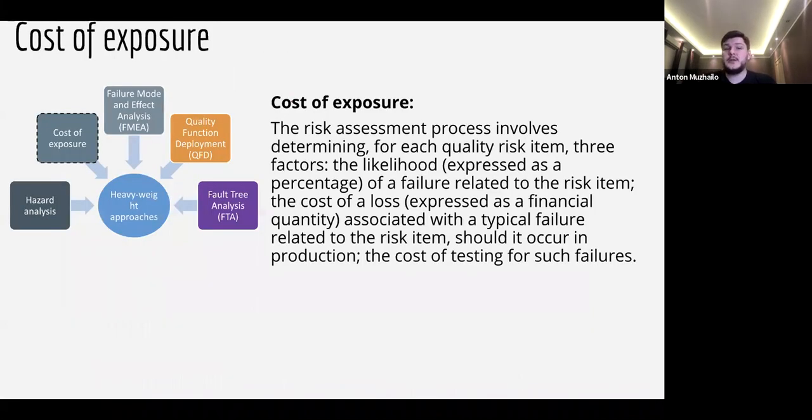So what about the cost of exposure? I was talking recently regarding the price of dealing with some risks, right? So there is the mitigation cost and there is the risk cost, and we need to figure out somehow what costs more, the mitigation of risk or the risk itself. So it also responds to a question: should we accept this risk or better mitigate it? So this is where cost of exposure comes into play.